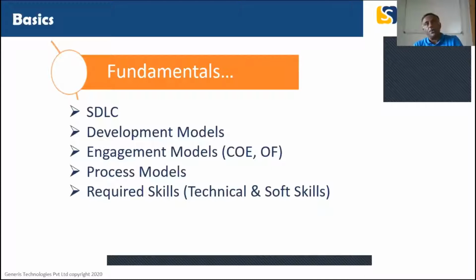And then the different development models. As I told you, one is the top-down approach, where you completely do the development, then do the testing, and then go live. The other is the agile model, where you do incremental development. Feature by feature we keep adding, and there is strong adoption of this model in today's industry, where we have Scrum Masters and Scrums, and we call them storyboards. The use cases are now called storyboards, and each storyboard will have 20 or even 30 stories that they group into a Scrum. They will develop 20 features and then go live, then take up another 10 or 15 features and go live.